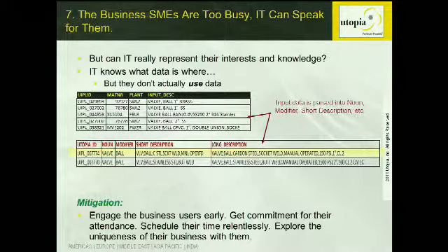So the mitigation here is engage the business users early, get commitment to their attendance, schedule their time relentlessly, and explore the uniqueness of their business with them. And I'm serious, when you start your data migration project, you have to work with the subject matter experts and you have to tell them, for some of you, it's going to be a full-time job. You have to give us 20 hours a week just to work through the various points that we're talking about.